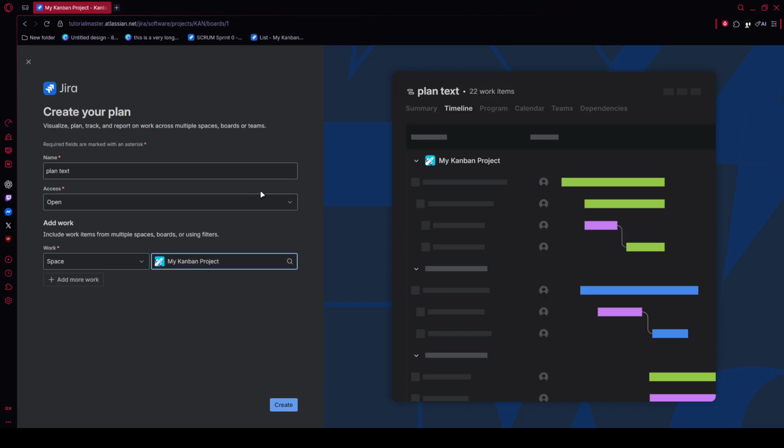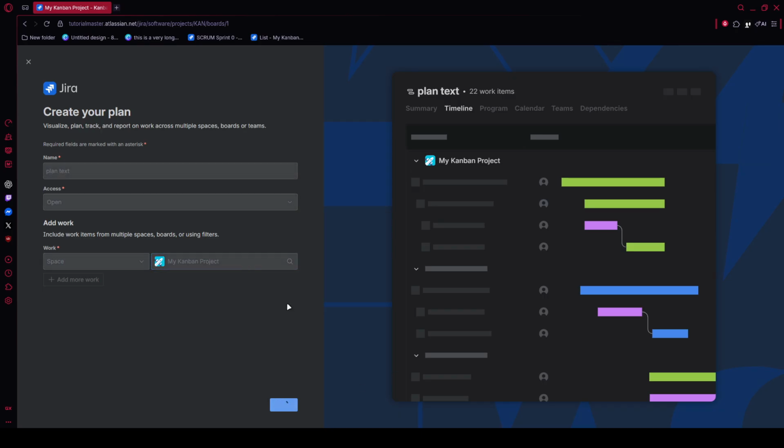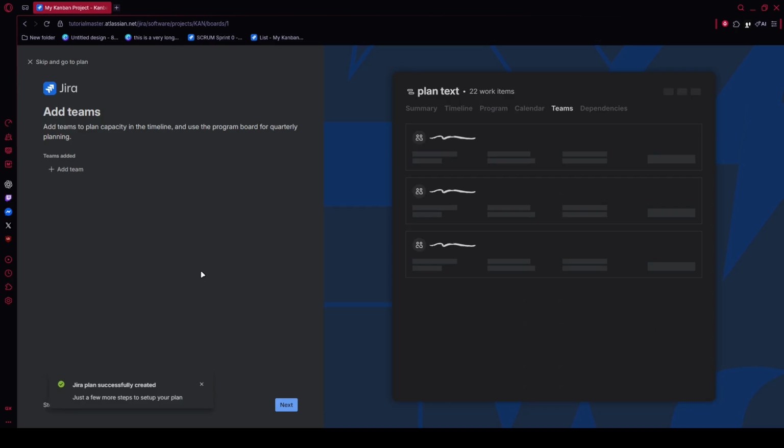Next, open the team's settings from the left sidebar and choose the team you want to configure. Under the team's capacity settings, decide whether the team works in hours or story points. Then enter the baseline capacity you want Jira to use, such as a sprint velocity target. This gives the plan a realistic reference point so it can flag overloads accurately instead of relying on guesswork.